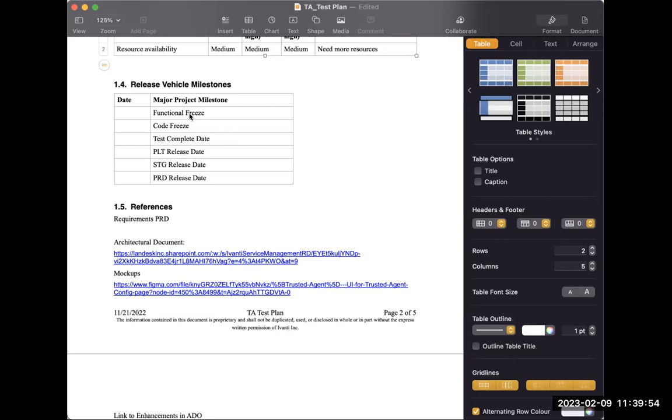If there are any changes required which are of low priority, we'll do them in the next releases, not in the current release. If the development is halfway through and the product owner comes and wants to remove some filter buttons or add some filtering options, then if it is removing, that could happen very quickly. There is no problem.